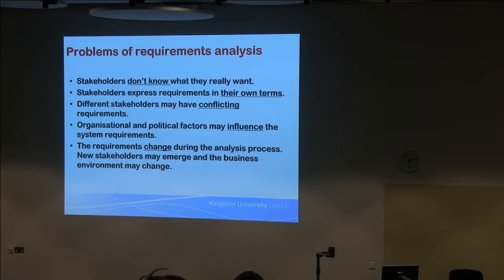And then when they showed it to me, I couldn't do something as simple as searching for all students in the School of Computer Science and Maths that don't have a personal tutor. Now, as a person who allocates personal tutors, that's a fairly obvious thing I need to be able to do with it. Why did they not input that key bit of functionality? Because the only stakeholders they involved were management types. Very different context. They defined what they needed from the system.